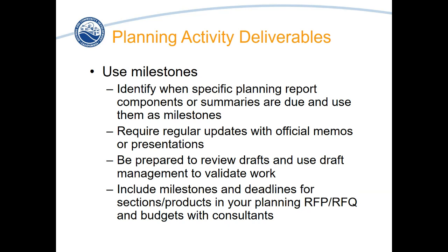You can also use draft review and draft management to validate and as milestones. For consultants, it's not uncommon to have a first draft of some component or some chapter or some part of their work be required as a milestone. When you're setting up your deliverables, milestones and tasks, you can also align this with your budget, especially with construction work, consultant work or subrecipients. This allows you to identify how your budget structure can fit with the deliverables and the tasks, and allows you to be really responsible and have a very detailed and product-oriented budget.